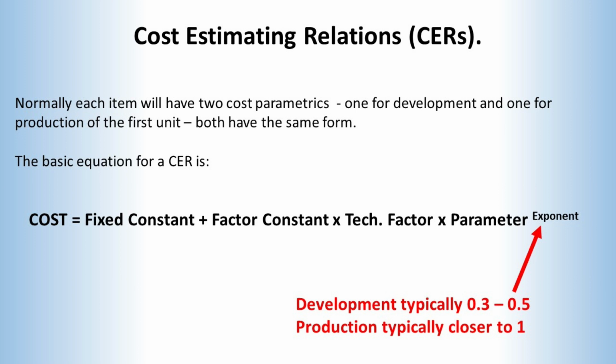At the other extreme, if the exponent is less than about 0.3, then you're probably not going to get a good correlation with size, however you choose to define it, and that may mean you need to look at some other factor.